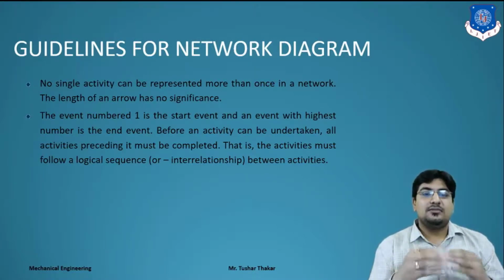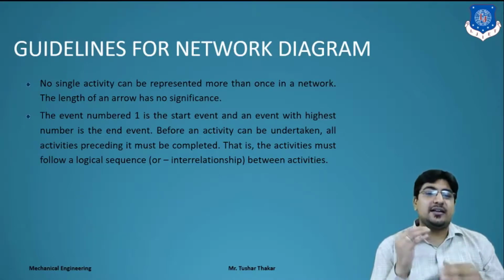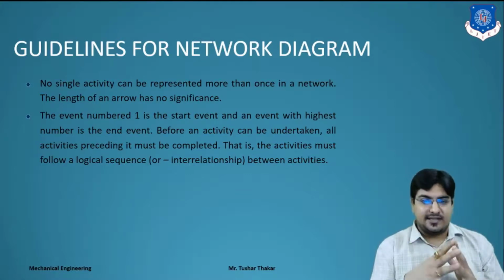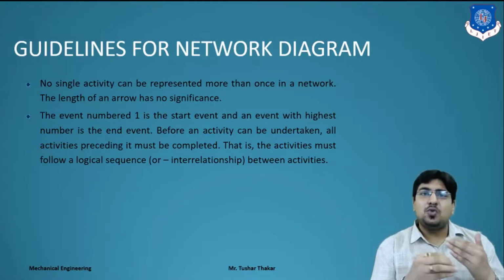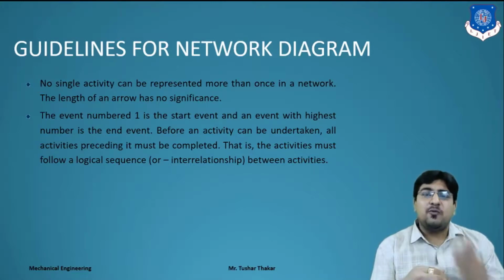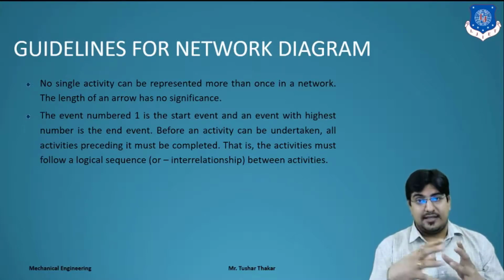Clear? Before an activity can be undertaken, all the activities preceding it must be completed, and the activities must follow a logical sequence. It means we have to draw the network perfectly and give the correct relationship of all activities as preceding activities and successor activities in a logical sequence.